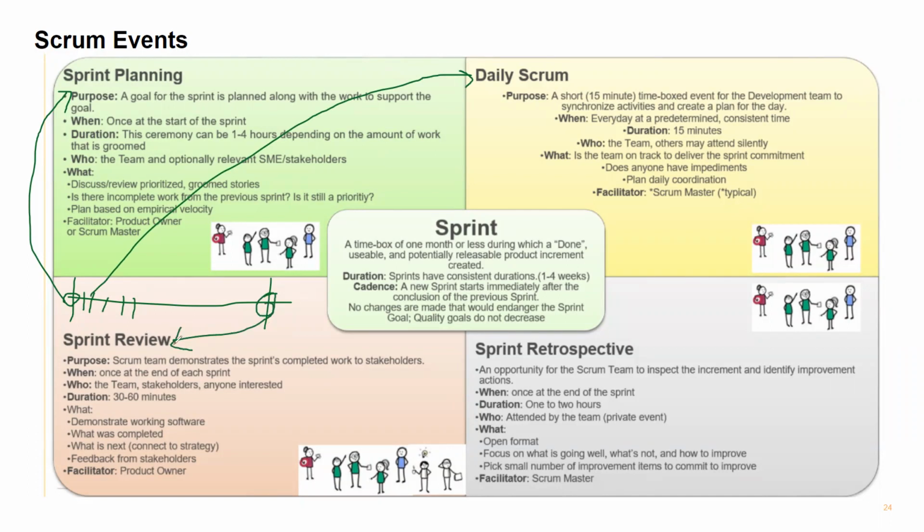What will you review here? What we did, how we did it, what difficulties we faced, and how we can achieve what you have planned: planned versus completion. If you committed to 5 items in your sprint planning, you will see whether the 5 items were completed.